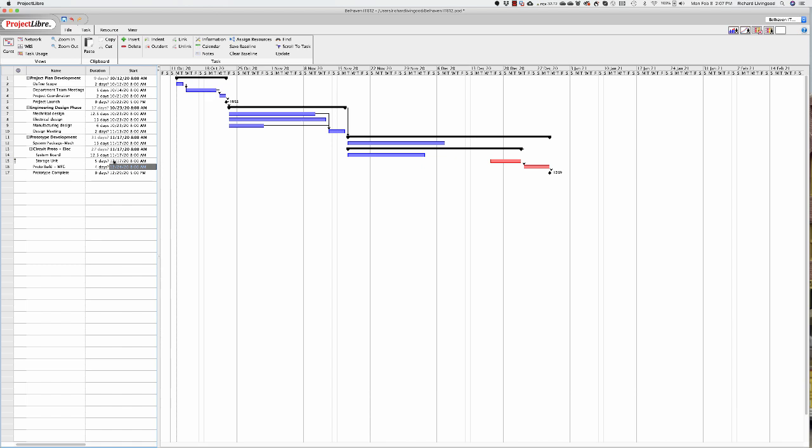So again, that forces the issue out. And now look what happened to the critical path. Because one group could not start at a reasonable time with everybody else, the critical path is just that item now.